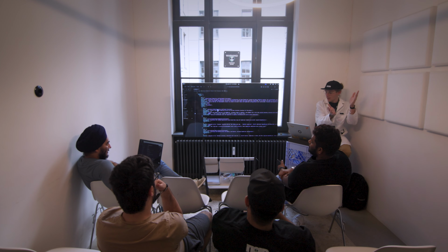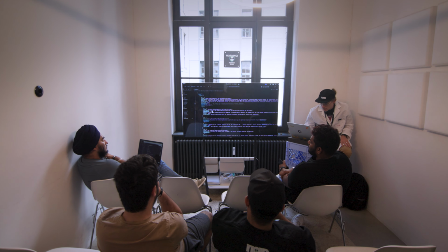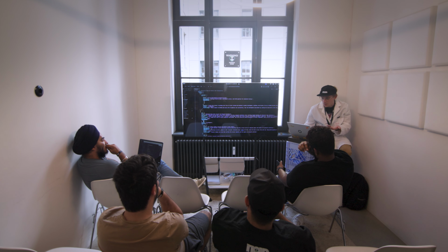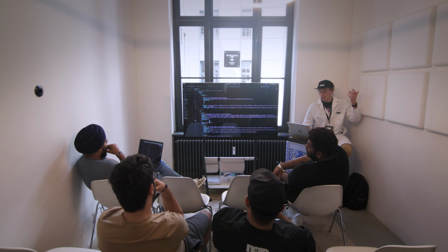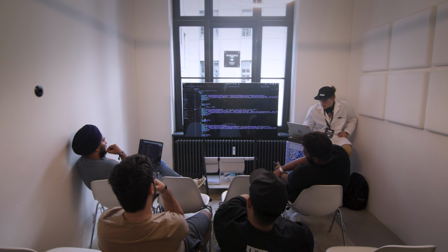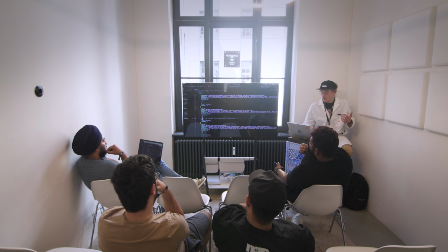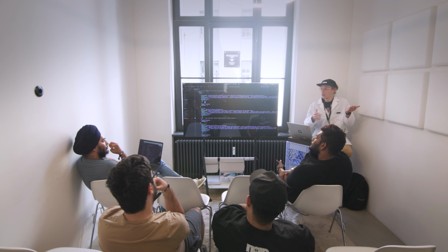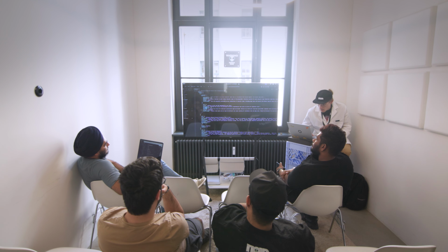They're kind of like scopes, so they can be done independently. There's a dependencies list. So if you look at some of these dependencies, for task 2, number 1 is a dependency of number 2, so that means task 1 needs to be completed first. If you look at some of these later ones, like task ID 13, it only requires 2, 3, and 5 to be done first. So these have various dependencies. You don't have to go in strict order, but there is some ordering that's required, and it has it defined here.